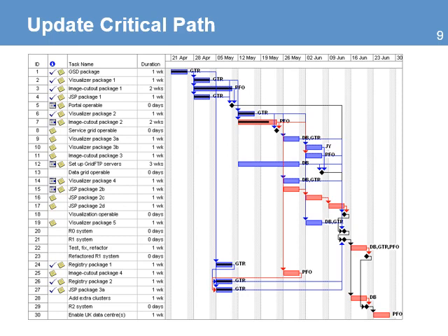Here's an example of a complete Gantt chart where you can see the progress made to date marked by a black line on each blue bar. In this example, some activities are now completed while others are still pending. You can also see the critical path of the activities where the bars are in red. All the arrows on the chart identify the dependencies between the activities.